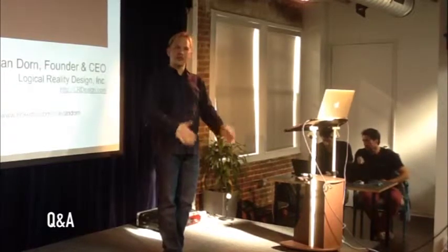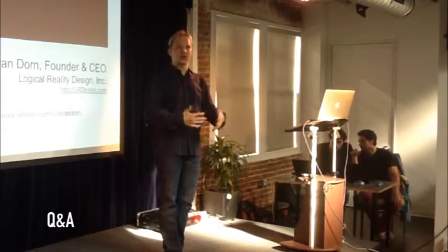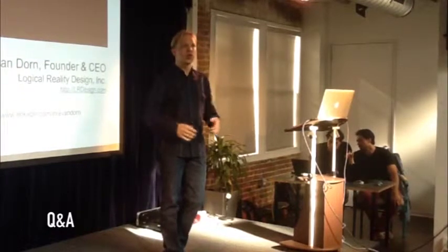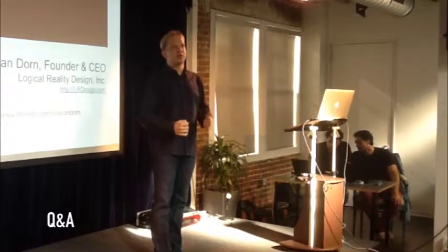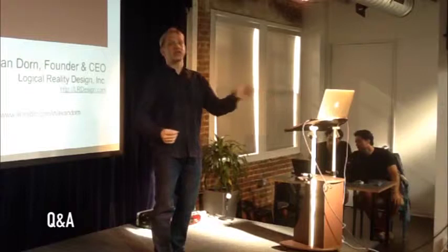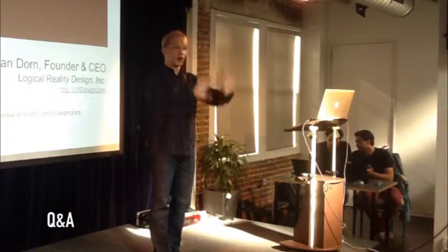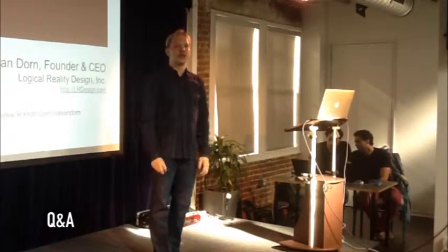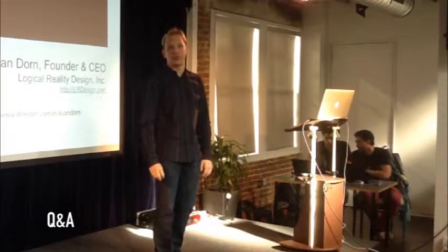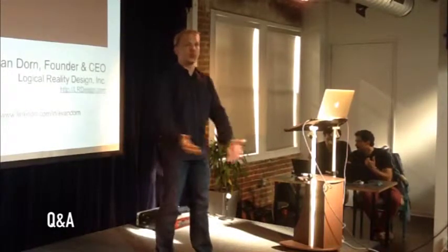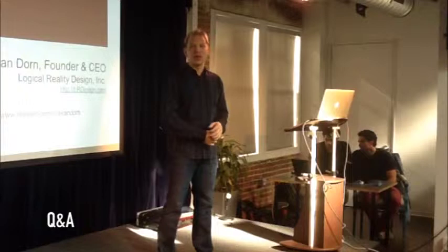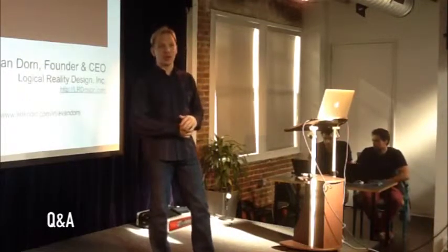Unfortunately, they don't happen often enough for you to see that within a couple of iterations. You'll only see that over a year or 2. So another approach might be to budget items in your planning system that say, all right, here's a 5-point ticket for the inevitable security failure that happens in these 6 months. And so you're budgeting for it on that level. But it's a difficult problem. I don't have any perfect solution for it.